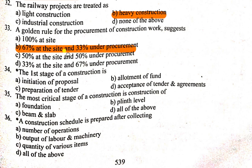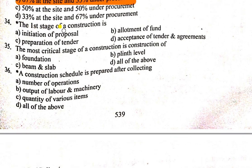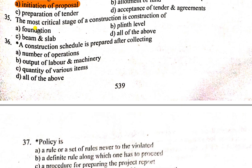Question number 34: The first stage of construction — options are: initiating of proposal, allotment of fund, preparation of tender, and acceptance of tender. The first stage of any construction is the initiating of proposal.